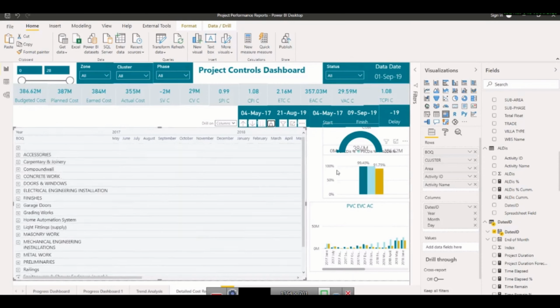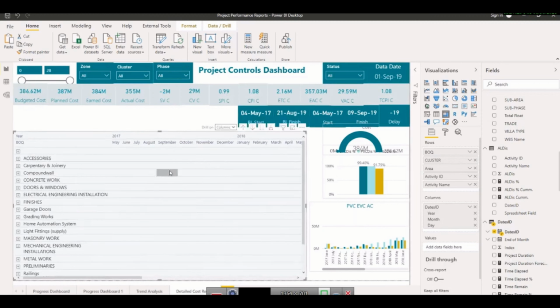So what else do we need? This we are just looking for a little bit of layout, then we will decide what type of things we can put here and there. So what is going to be in this part, here we can have cost variance and schedule variance. Here we can have SPI, CPI in each month to see against each of the values, because we need to put some KPIs in order to get the result. So in each time period as well.